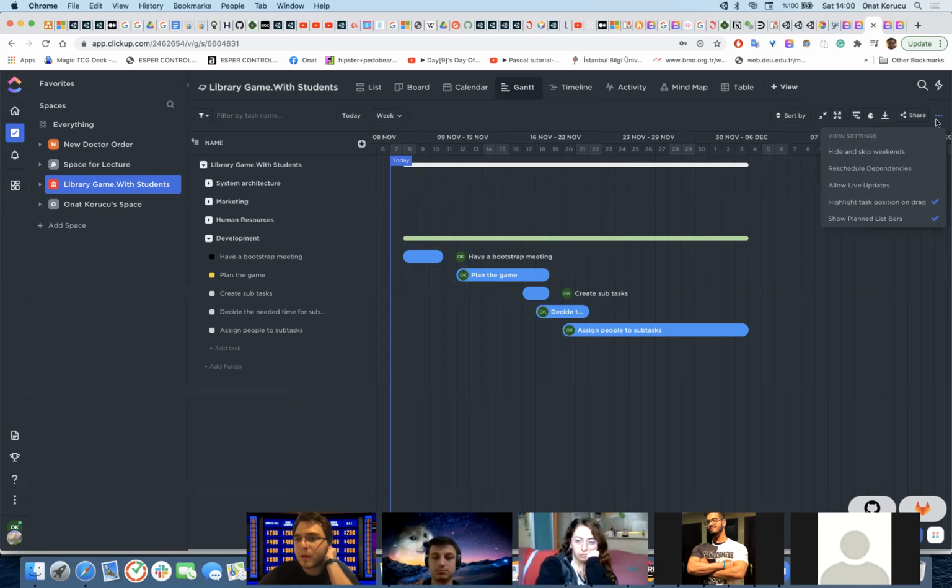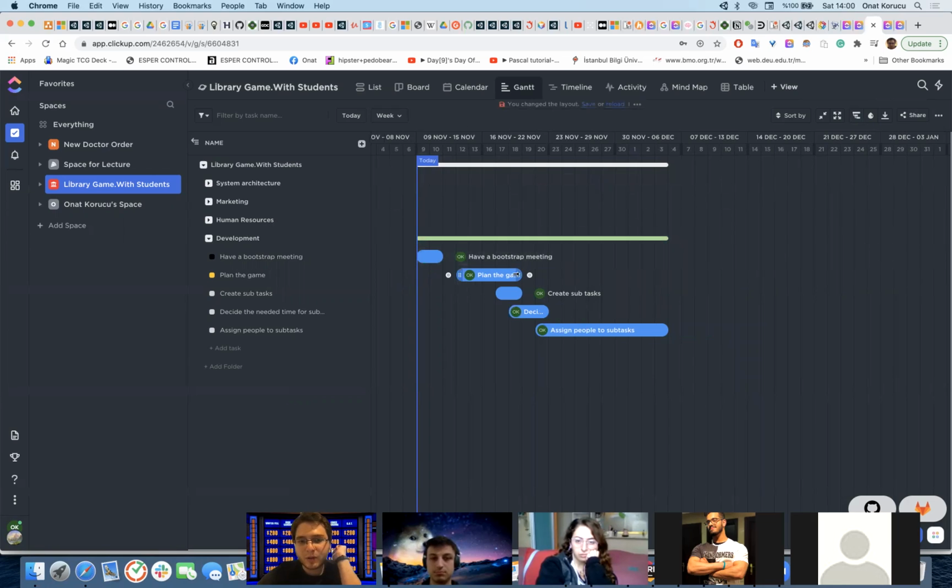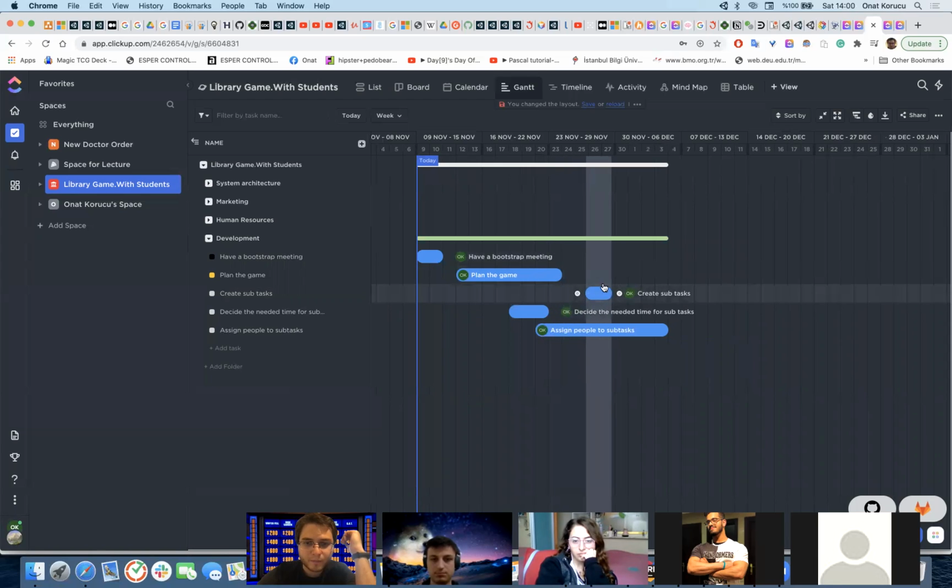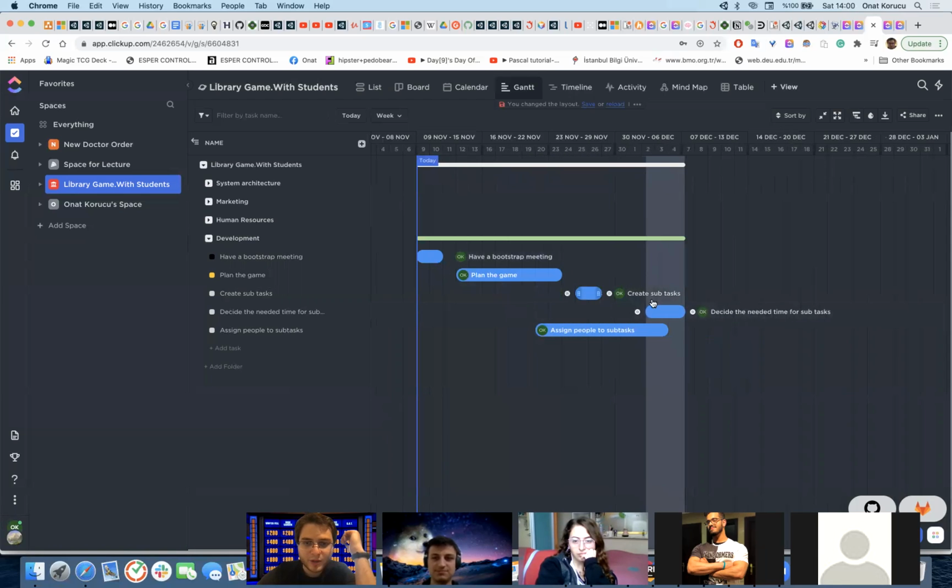Good thing is I can choose to hide and skip weekends, and let's click on that. As you can see now, I don't have to calculate weekends. This does it for me. So if I need 7 work days, or let's say I need 8 work days, I can basically go until here and it has 8 workdays for this task. And I can also arrange the time I start and end.